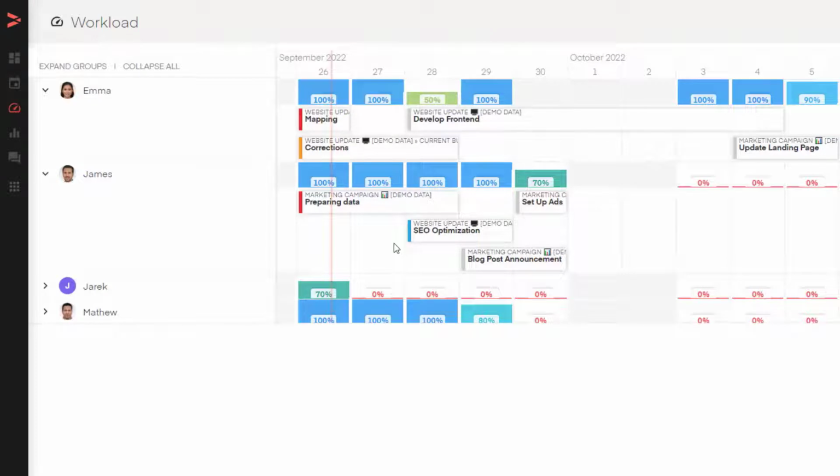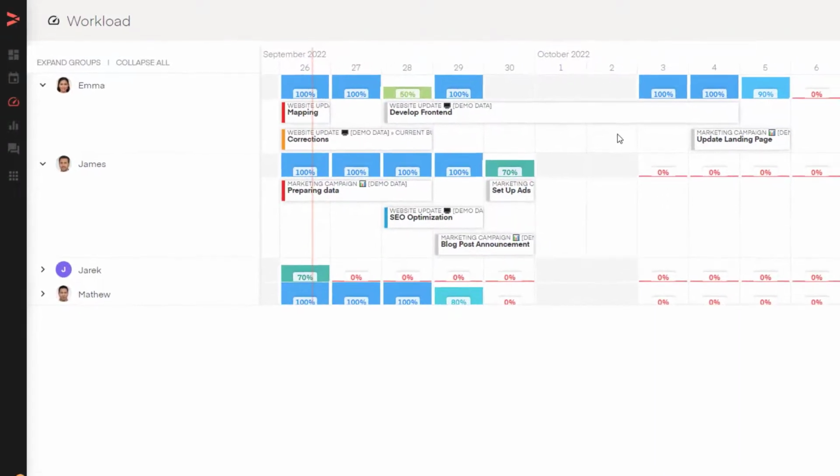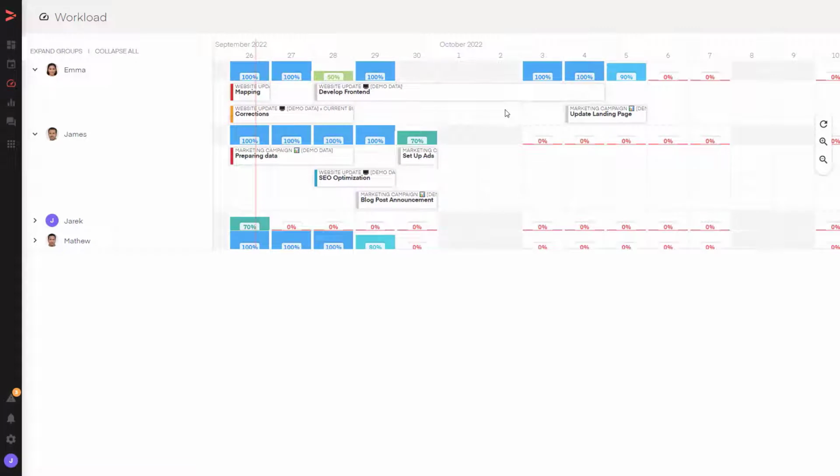That means that if a user has no tasks assigned and has the proper skill, Planless will plan the task so that the user is fully committed to it, and probably it will be shorter compared to the case where the user already has multiple tasks assigned but is not yet fully committed to them. So there is a pretty complex set of rules and automation that tries to balance the priority of a task, how much time users with a certain skill have, and when the task should end.